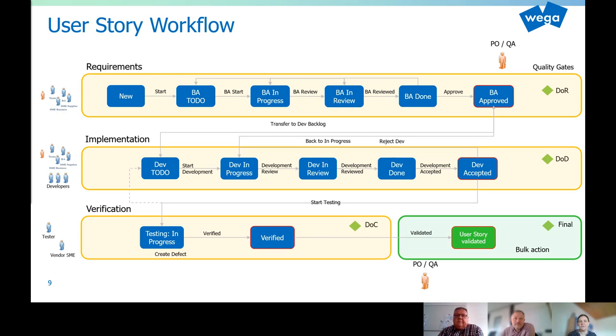privacy? Then we define the requirement implementation type for each requirement, like is it a standard implementation, is it configuration, or is it customization? And based on this, we define the appropriate risk mitigation strategy according to the definition made in the validation plan. So risk mitigation might be by testing, or by any other verification activities like providing training, creating standard operating procedures, or defining service level agreements. In case of testing, we differentiate between unscripted testing and scripted testing, and also between different levels of testing like functional or user acceptance test or IQ.